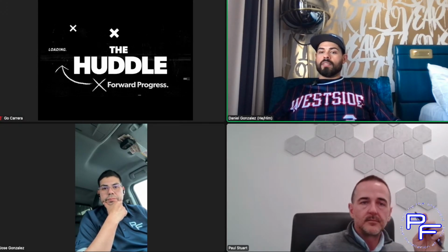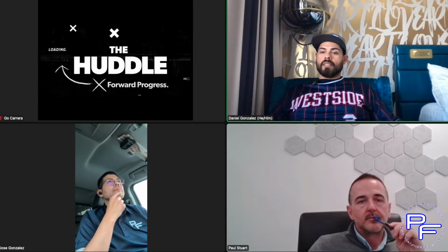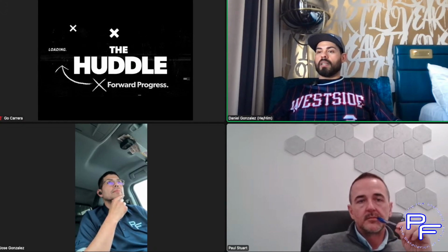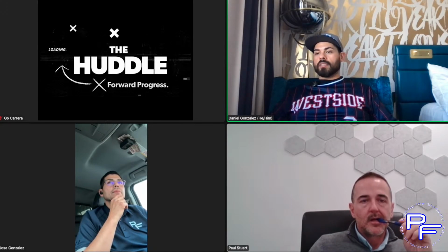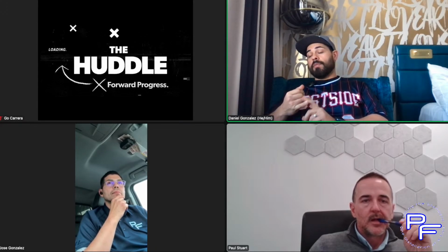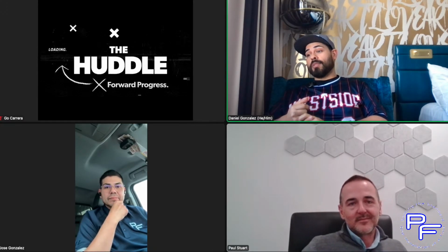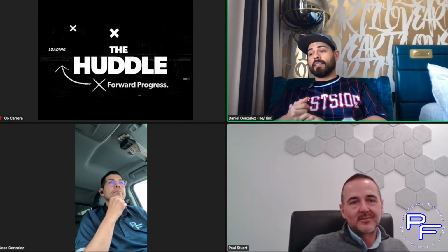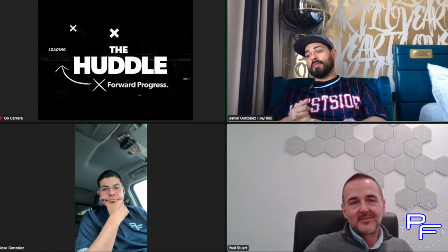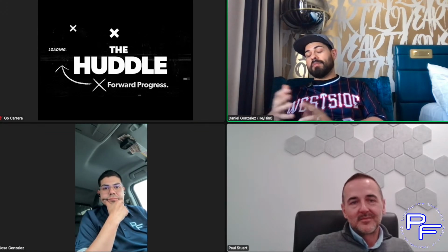Just closing out, take nuggets from everyone that you talk to, just like we did, and include those in your inclusions and exclusions. Because like I said, if they don't want you to do moisture testing, you have to let them know that it still needs to be done, whether it's in the documents or not, because you're liable as soon as you start installing. If you don't ask for results, in most cases you just bought it if anything happens.